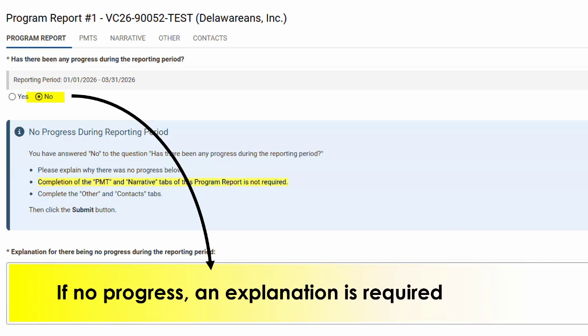It could be as simple as there were bureaucratic delays in accepting the award and being able to code spending to the project in your agency's accounting system, which ultimately delayed program progress. Or your agency may have experienced unexpected personnel turnover in a position that was providing sole services for the project that fully delayed the implementation of activities until you could fill that role.